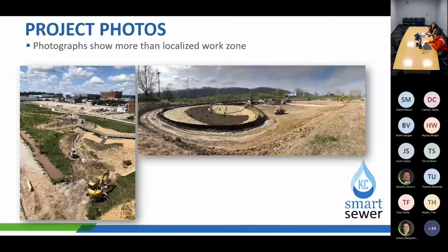So if you do use your cell phone, these days there's an option to use a panoramic picture. Also, just taking an overview of the project area can be beneficial. The photo on the left is the CID project. The particular work that day was within the channel. But this photo was used later on to demonstrate some lack of watering by the subcontractor of the sod and also some dying trees.